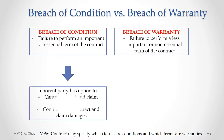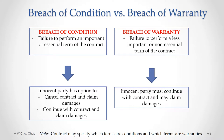With a breach of condition, the innocent or non-breaching party has the option to do one of two things: that party can walk away from the contract, cancel it, and claim damages; or they can still continue with the contract but still have the right to sue for damages from the breaching party. With a breach of warranty, the choices for the innocent party are much more limited — the innocent party has to continue with the contract, but does have the ability to claim damages from the breaching party.